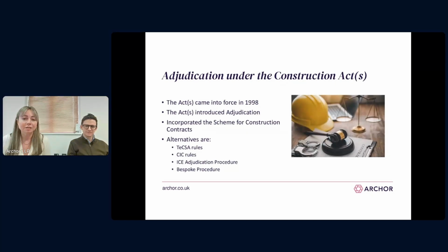So we touched again on this on session 2, but as part of the Construction Act coming into force, it also had the add-on of the scheme for construction contracts. So if your construction contract doesn't have the right provisions in it, the scheme will set out what the adjudication procedure is. So JCT, for example, says that the process for adjudication is the scheme. There are other procedures that can be used, such as the TeCSA rules or the CIC rules, but in our experience, the scheme remains the most popular. I should just say on that image, I don't know why there are handcuffs on there. They're not relevant to the Construction Act.